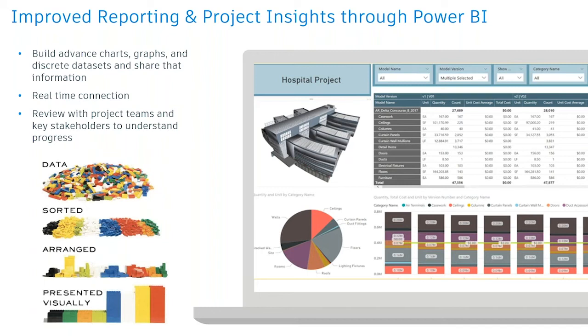I have worked with customers to do advanced tracking of progress. I then see people taking that progress and tying it directly back to their timesheets out of tools like Rumbic, tracking man hours, and then tying that back to the budgeted man hours, the budget out of the ERP system, so they can track utilization, they can track trends, they can track so many advanced things as they go throughout their process.